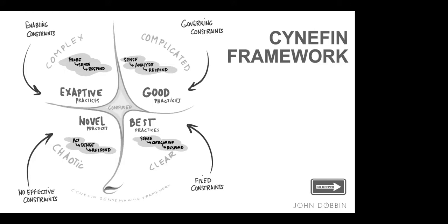In terms of IT systems, things get complex mostly when we don't understand the technologies fully and we don't understand the requirements, especially the requirements. This happens a lot when the business requirements are changing.